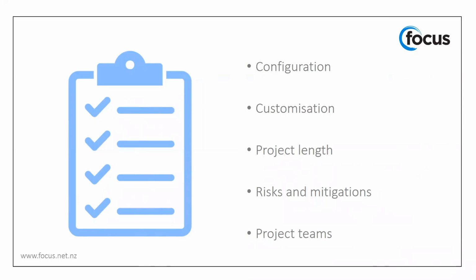It's only at this point that the customer will really start to get a firmer indication of the costs relating to the project. Depending on the software, the licensing may be an upfront purchase or a monthly user fee, which is typical of cloud-based software running the software as a service model. The labour consultancy costs from the partner can be invoiced in a few ways, and often finance is offered. Perhaps, Renee, you can outline the common options when you're purchasing an ERP system.